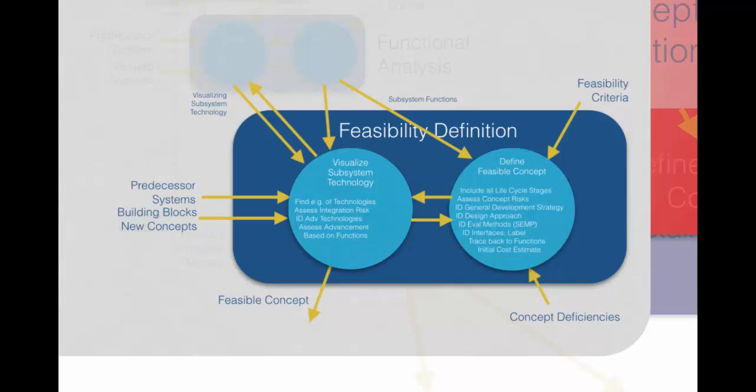Could a drive-through style setup work for this? Perhaps one machine can open the door and another moves into position and opens the cap, and so on. The point is not to define a definite solution, nor to decide which one is better than the other, only to identify that there are existing technologies that can be tailored or used to perform these functions, or identify those functions that may require some research and development of some new technology to insert. These are risk areas that will require more focus during the next phase, which is concept exploration.